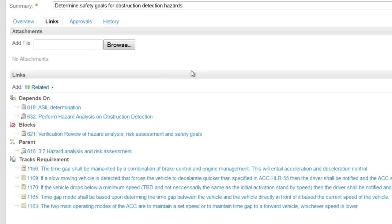The first thing you'll see is that this child task depends on two others, performing hazard analysis, which identifies safety goals, and determining the ASIL rating for each of those safety goals.